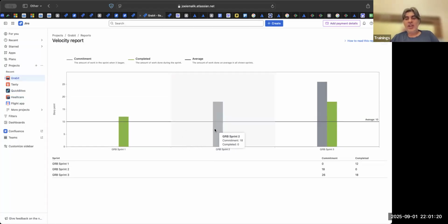So in second sprint, let us say there was some issue. The SIT server was slow. Team could not complete their testing. All the stories got a spillover. So in that case, how many story points we did? 0. And then there is a dip in your velocity. Your average is only 10. But your average will increase because you will complete those points in the next sprint. You can still claim your points. Instead of in this sprint, you are claiming these points in the next sprint.